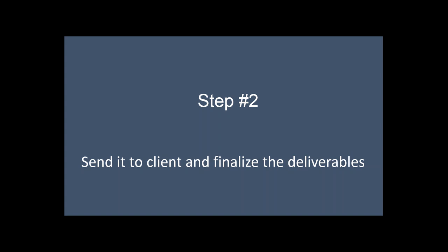All right, so collect the information, make the document of what exactly the customer is looking for, and write down the deliverables. Like, the customer wants 5 Zapdeal pages, 500 quantities each, the deal is expiring on a certain date.